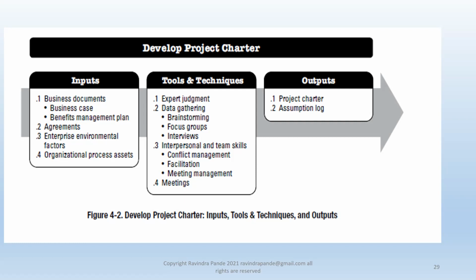The output is the project charter, a document such as a Microsoft Word or Excel file, given as an output of the develop project charter process. Normally, the develop charter process happens at an early stage, after the kickoff meeting or during the various kickoff meetings. A kickoff meeting is normally not just one meeting. Here we are talking about 4-5 successive meetings, because a meeting is normally planned for a maximum of 1 hour; if you go above that, you might disturb other schedules and other work.